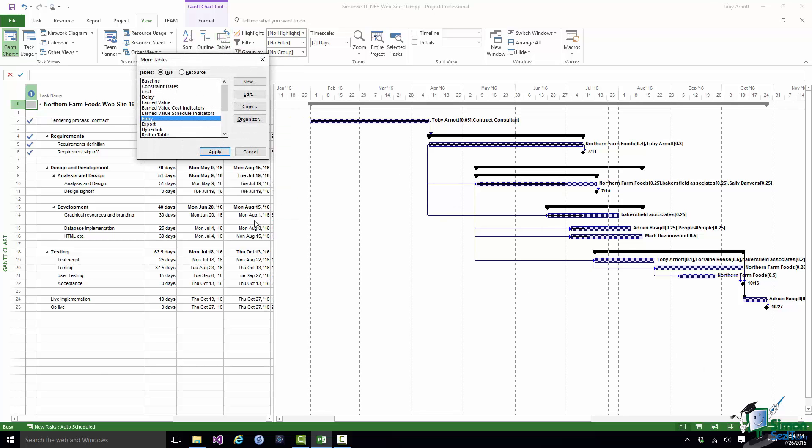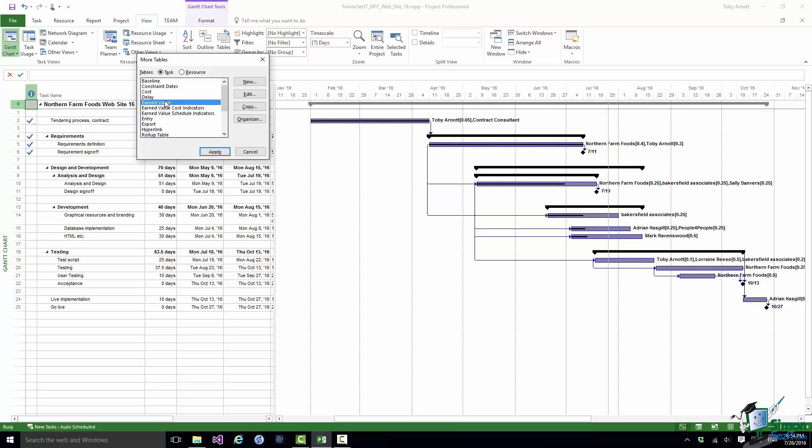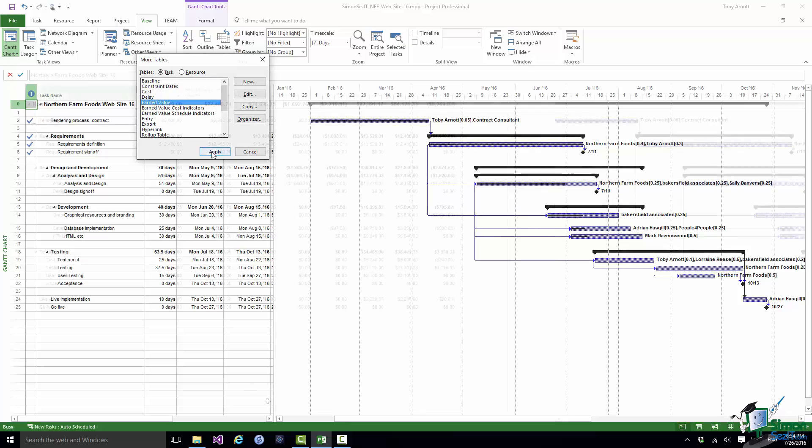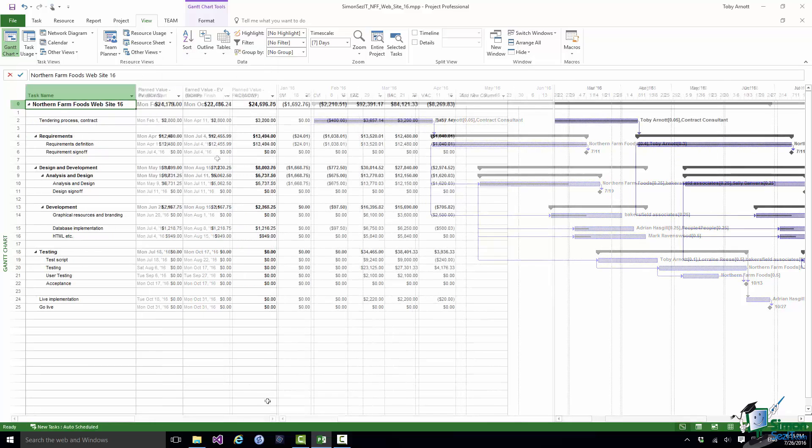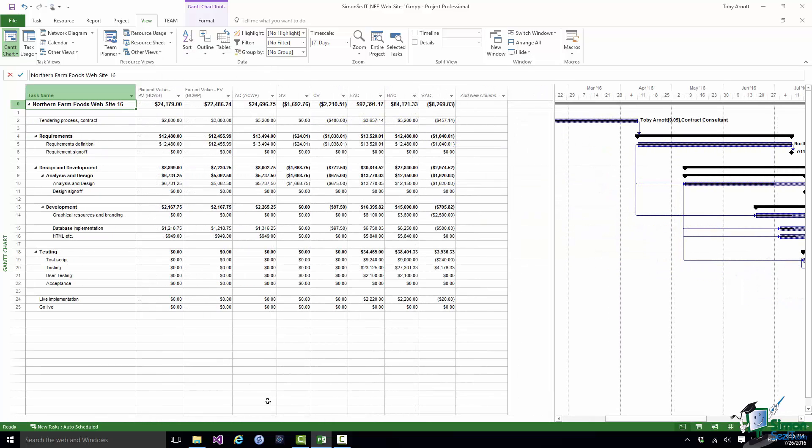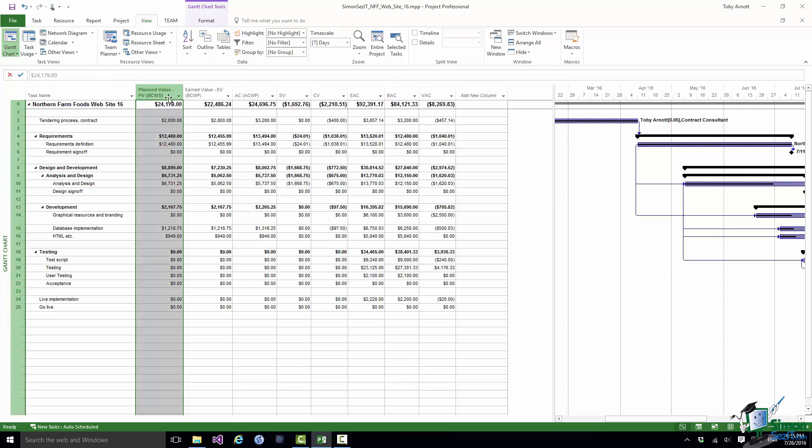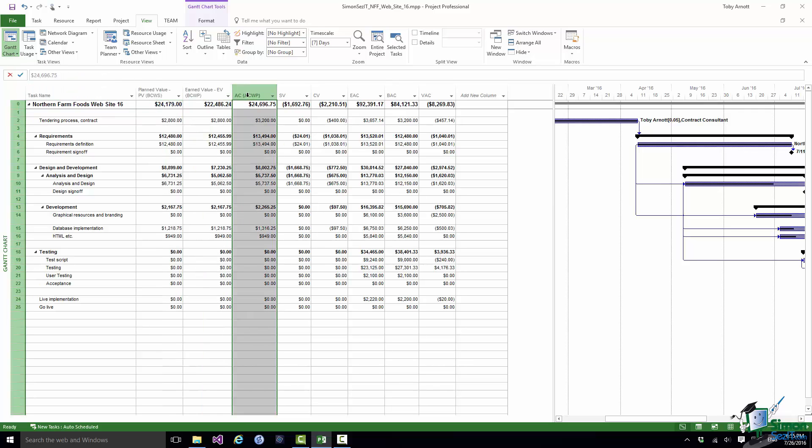So more tables. And there are three, Earned Value, Earned Value Cost Indicators, and Earned Value Schedule Indicators. Now let's start with the Earned Value Table. Now bearing in mind that your tables may have already been customized compared to the standard, what you will normally see in the Earned Value Table first of all is a set of three columns corresponding to PV, EV, and AC.